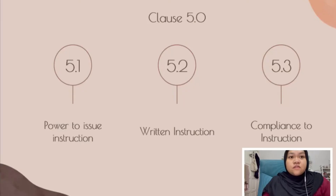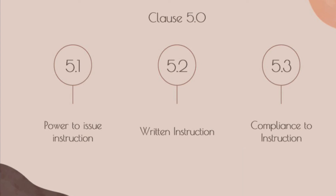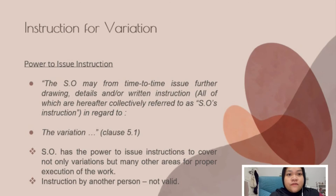Next is Clause 5.0: Clause 5.1 - Power to Issue Instruction, Clause 5.2 - Return Instruction, and Clause 5.3 - Compliance to Instruction. Clause 5.1 explains that the SO has the power to issue instructions to cover not only variations but many other areas for the proper execution of work. Any instructions from any other person are not valid.